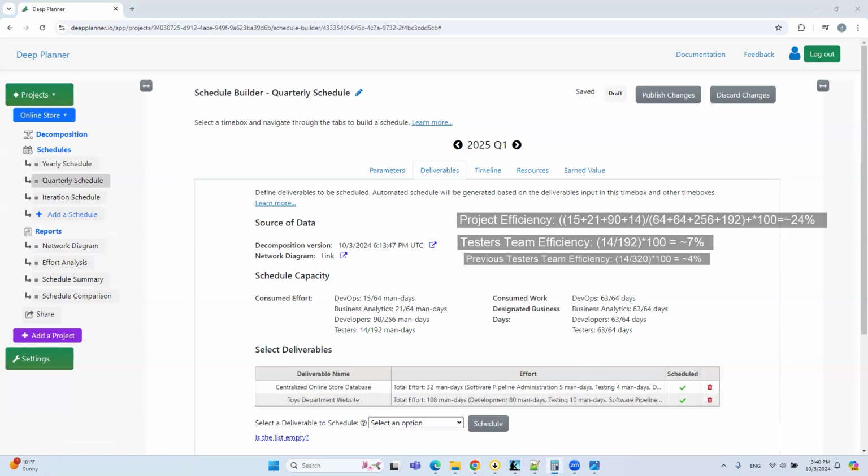Keep in mind that although decreasing the team output has increased the efficiency of resources used, it now places the rest of the team under higher pressure. Balanced efficiency percentage shouldn't be very high, but ideally in the range of 20 to 30% per the measured time box. Measuring efficiency is a very effective instrument to achieve and control the optimized use of resources in your company or the projects you're working on. If used correctly, it enables great improvements and cost-effective planning of your development. So make sure to include those metrics in your toolbox.